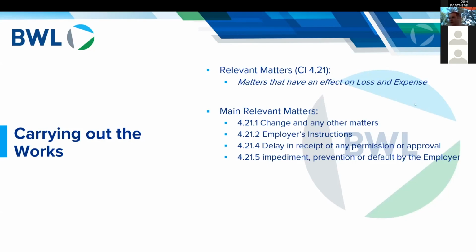So, how these terms are interpreted and how you actually follow the procedures are very critical, because in that case, the claim for loss and expense for something the employer had not done came after the point in time in which the contract said they had the right to claim.